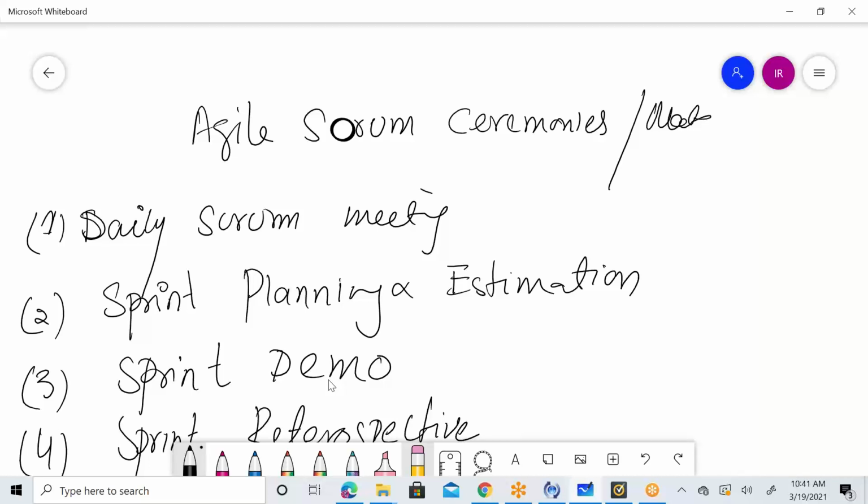User stories are estimated using user story points, which are Fibonacci numbers. User story points are 1, 2, 3, 5, 8, 13 and 21. More than 21 means it is a big effort that cannot be completed in a 2-week timeline, so that is called an epic story. Generally, most of the time, you will see 8 or at most 13 user story points for one ticket in one sprint. Generally they have 8, 5, 3, 2, 1. This is how they break it down. Further, they break it down.